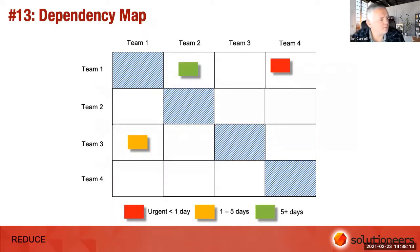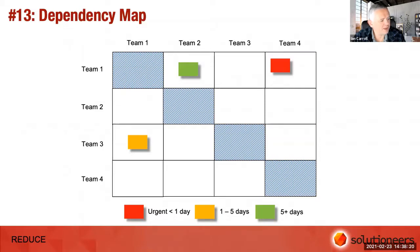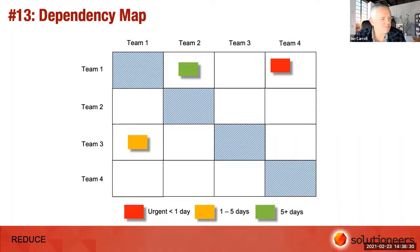Number thirteen: a simple dependency map showing who is dependent on whom. What I like about this — often seen in scrum of scrums settings — is you can colour-code dependencies to indicate urgency: urgent, imminent, or 'we're okay for a few days yet.' Getting that time dimension on there is quite useful.